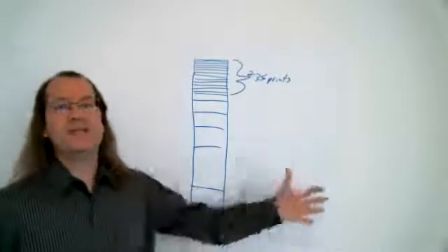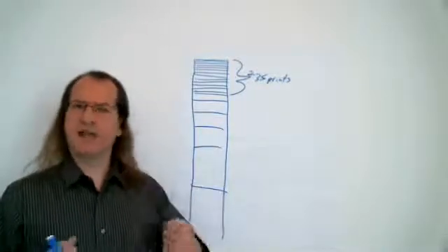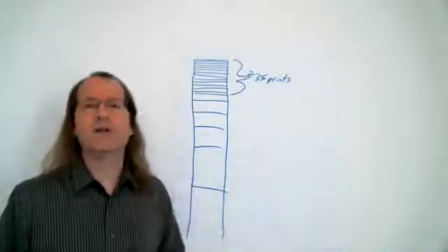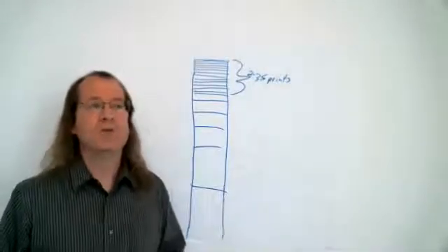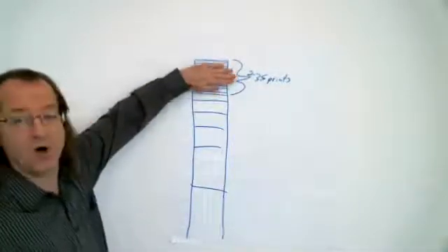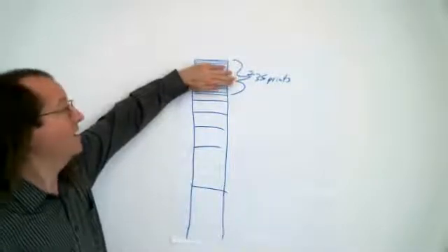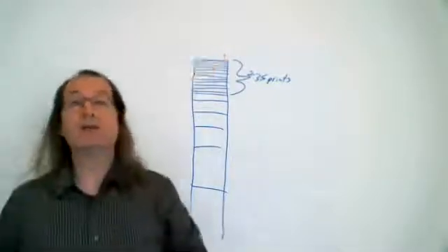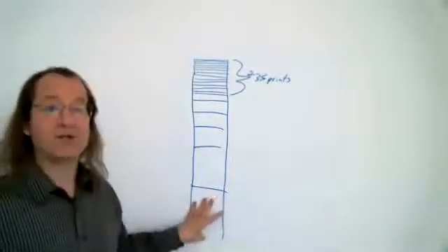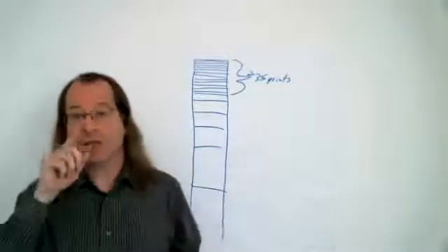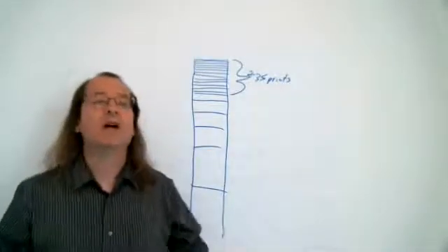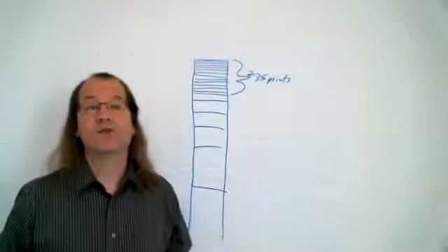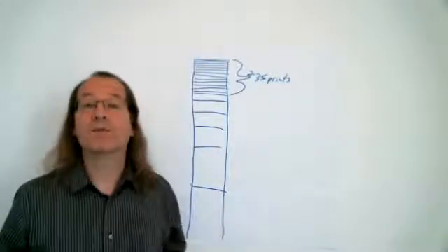Now, if the team only focuses on getting stories done, right? We commit to stories in our sprint planning. We put all of our energy and effort into getting those stories done this sprint. Well, very quickly what will happen is we're going to get through all of these sprint ready items at the top, and then at the next sprint planning meeting, we're looking at these like big, kind of ill-defined items, right? Maybe not the monsters at the bottom I was just talking about, but still we might be looking at relatively large product backlog items that are bigger and less well-defined than our definition of sprint ready. That would be a problem.